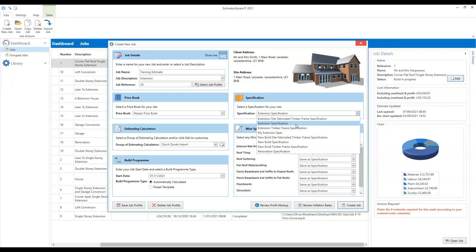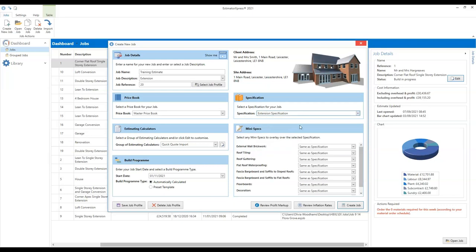The extension spec will also allow more time to complete the different labour tasks. It recognises that when you're doing an extension, you tend to be doing shorter runs, you have to take care of the existing property, and access might be limited — all of those things will slow down the work a bit. So the extension spec allows more time for the building work to be done. Select the extension spec as your main specification. Then we have what we call mini specs, which allow you to select some key materials or systems that you're using for this particular job.